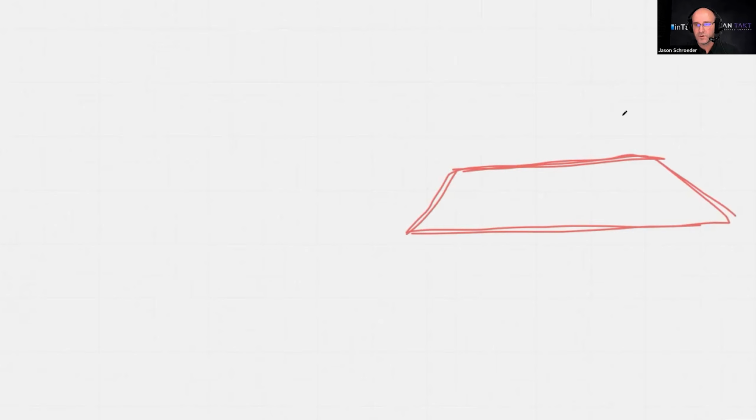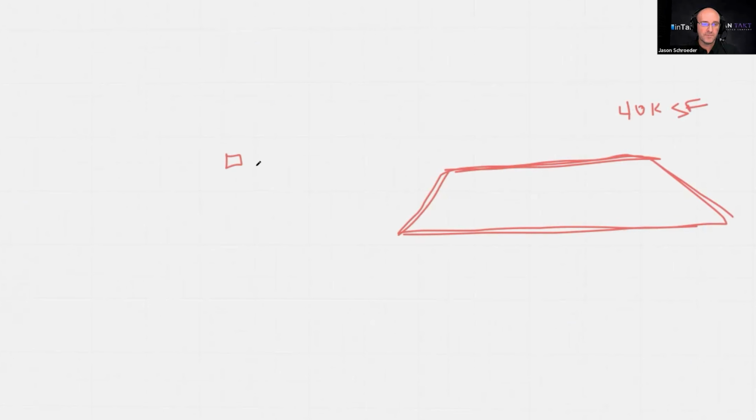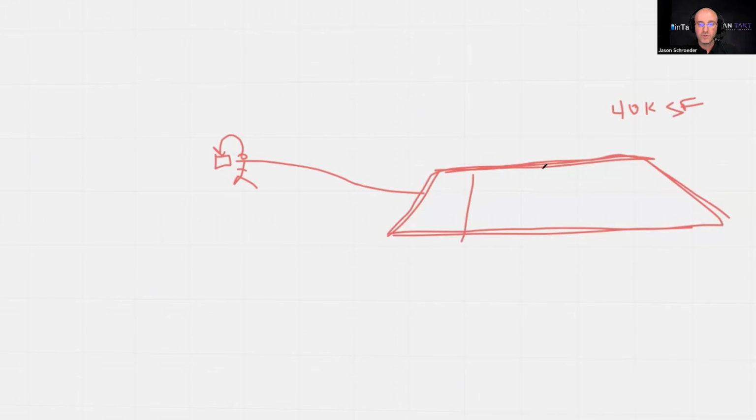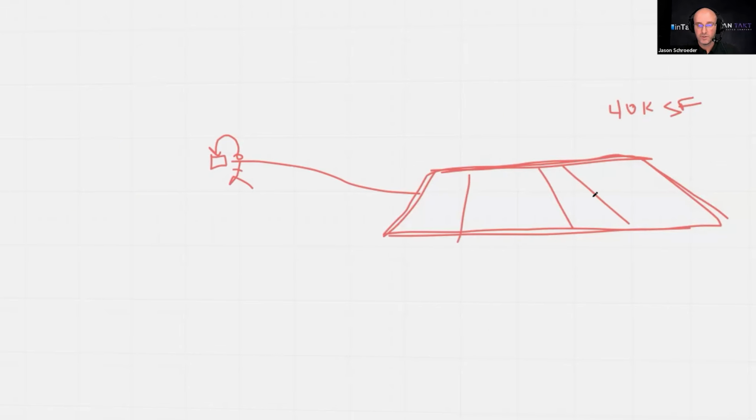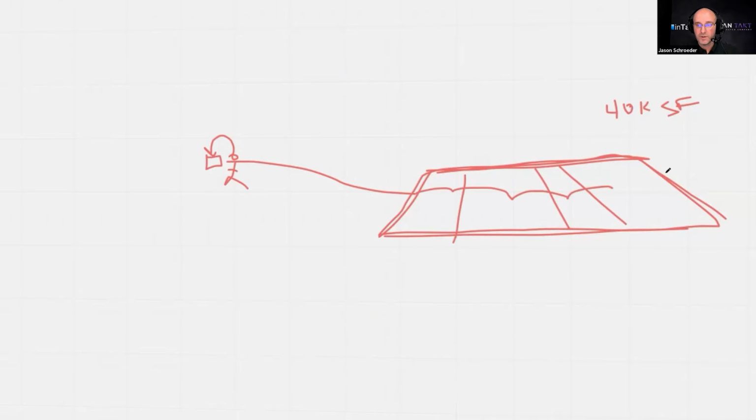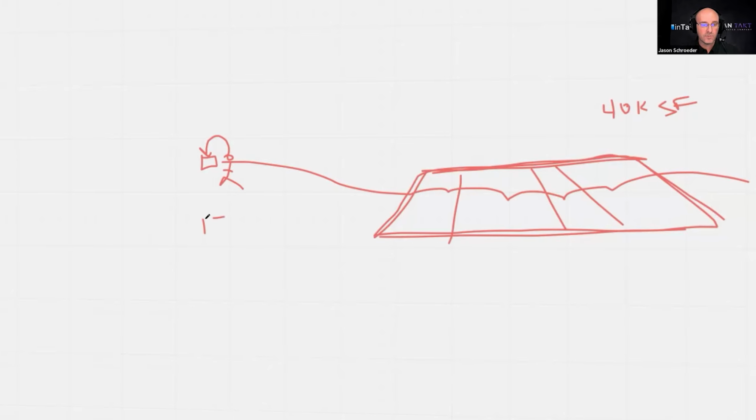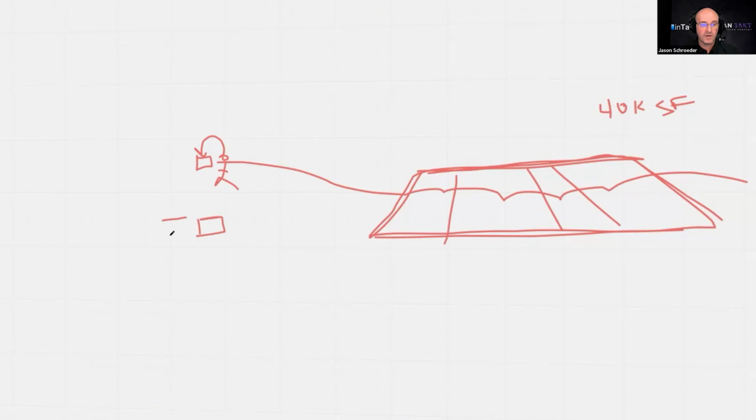Let's say you have a piece of work, right? And let's just say this is like level 2 of a medical office building, 40,000 square feet. Okay, not a big deal. All construction is, if we have one trade, we as the general contractor help prepare them and support them so they can come in here and work from zone to zone to zone to zone in a flow throughout the building. And Takt planning can work whether you have one activity or a train of trades.